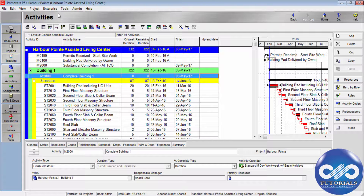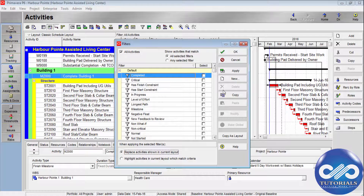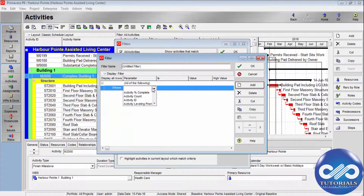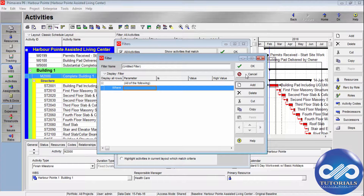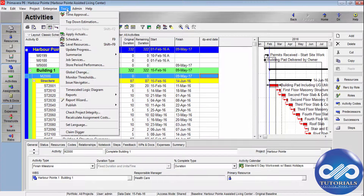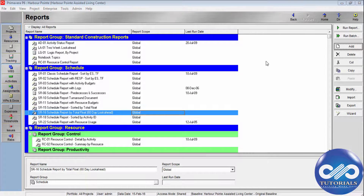You can even create activity filters based on a UDF. Go to Views and click on Filters. You can add a new filter, select the user-defined field DPEnded, and set the rules to create a user-defined filter.